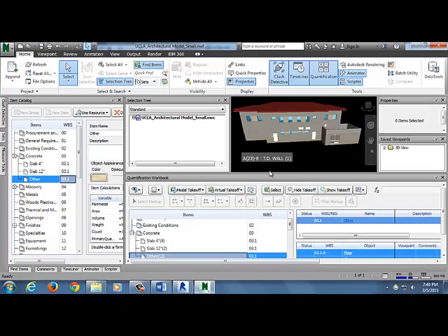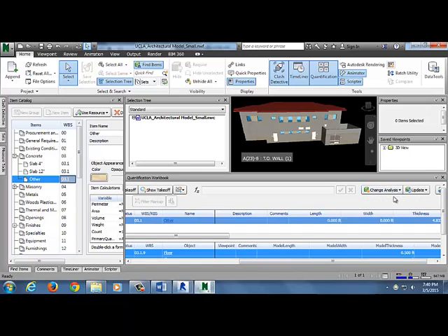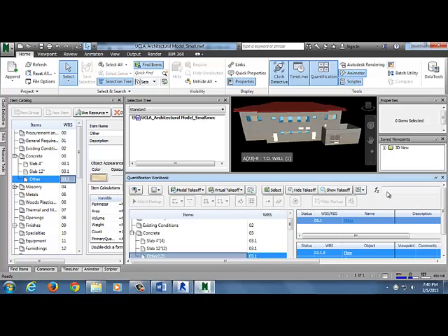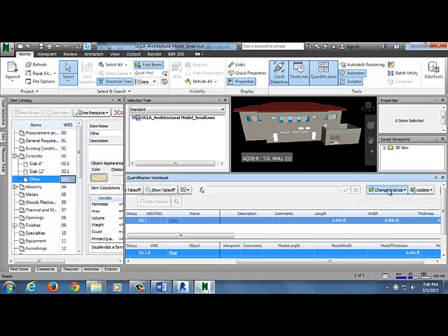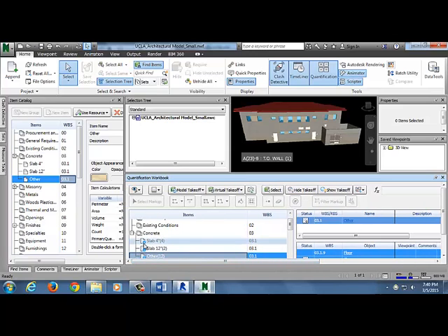So now that I've gone back to this, I'm going to come here, and I skipped the most important part to actually analyze changes. So we come here and we say change analysis. So to the far right of the quantification workbook, I click it and say analyze changes. And so now we see here that we've got some little icons. So that means something changed.